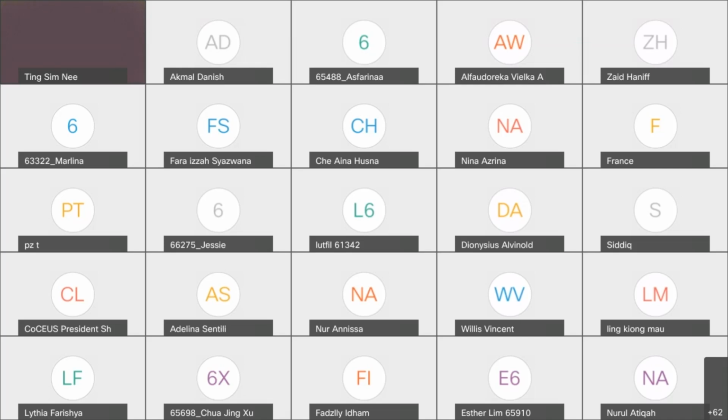It's the same thing for consulting as well. As mechanical engineers or civil engineers, if we are a consultancy, we will mainly only get our money towards the end, like maybe the latter half of the project. So you really do need cash flow to tide you through months that you don't have enough money from that project to pay your people, your workers, or your company expenses. These are all more of financial management.